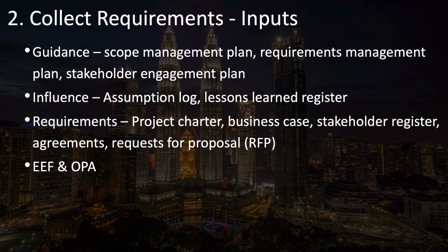In addition, there may be some agreements for you to look at. The first example is if your project is operating within the context of some existing agreements. These could be either internal agreements between departments or external agreements with other partners. The second case is that you may be revisiting this collect requirements process after you've gone through procurement and have a contract with a vendor, at which point you may need to review those agreements to make sure that you've captured all of the product and project requirements.